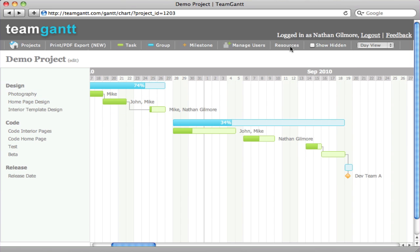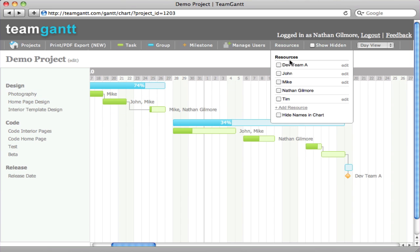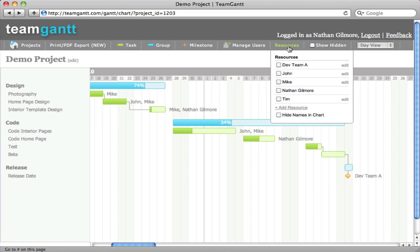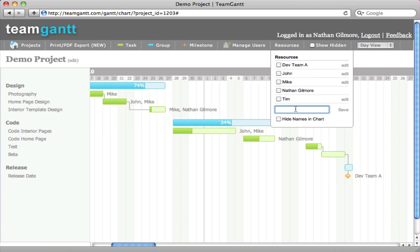Resources are automatically added to the list as a result of going to the Manage User screen and inviting users. If you'd like to add other resources to your project, such as the development team or maybe the client, you can simply just click add resource.